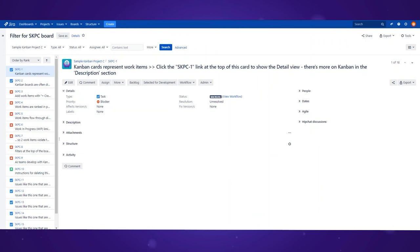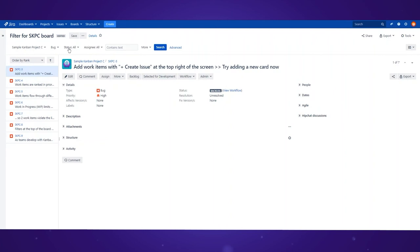But you can easily change that, for example by restricting issue types to show only bugs. Now you can see only bugs, so let's save this configuration and see how the Kanban board has changed.